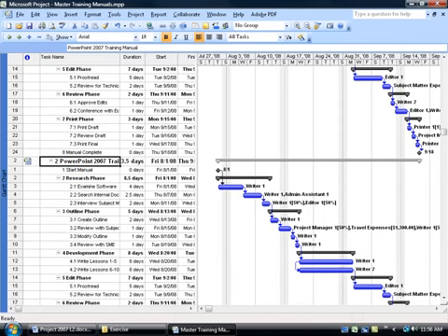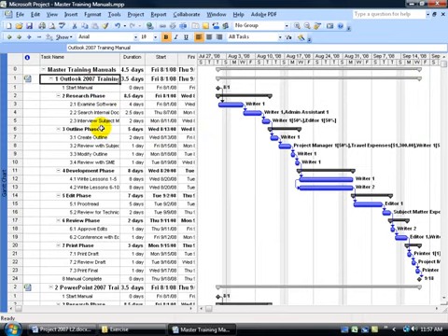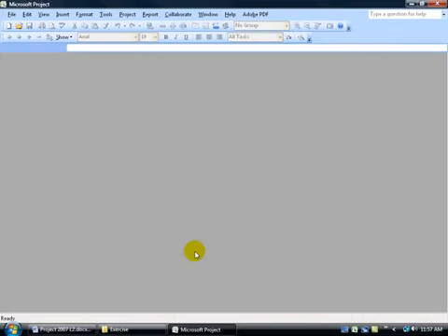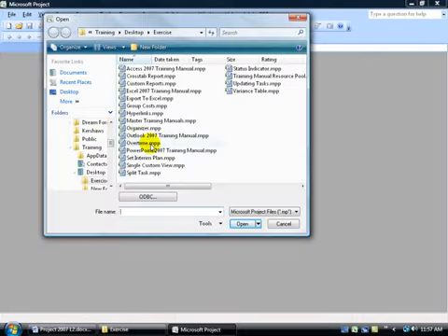Okay. So in order to do this, I need to set up the WBS codes at the individual project file level. In other words, I need to go into the individual project files here and set it up for PowerPoint. And then let me scroll up. Go to the individual file of Outlook and set it up. And then once I set it up in those two individual project files, I can come in here and I'll show you how to set it up for the master project. So let me close out of the master project and say yes, we'll save it for all of them. Click Open. Let's go to our first individual project file, which is Outlook. That's the first project within the master file.